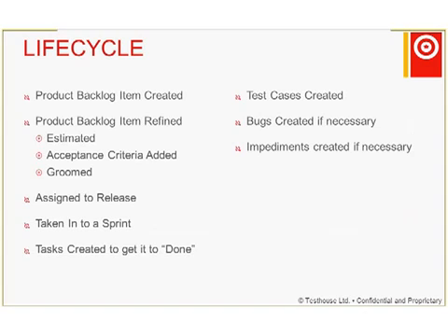The life cycle of a project: we create the backlog items, and then over time we refine them and give more details of them. That's generally the process of grooming the requirements to give more information on them, to specialize them to how the project is actually progressing. At some point, the requirements, when they are sufficiently detailed, are assigned to a release of the project, and then they are accepted by the development team as items to be done in a particular sprint.